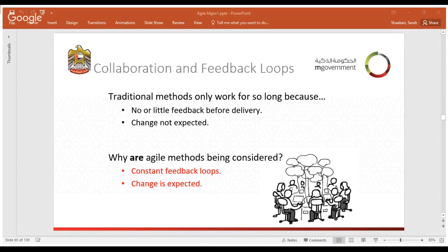Number two is how to make sure that those changes are planned for in the Agile life cycle. Those changes are planned for by the simple iterative incremental method of Agile. You receive the feedback, you may have a new requirement from the customer, and you simply add it to or remove it from the product backlog. While adding it to the product backlog, you make sure that you are continuously capturing the feedback from the customer.